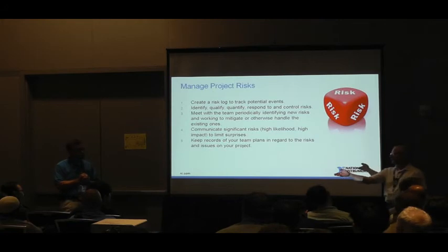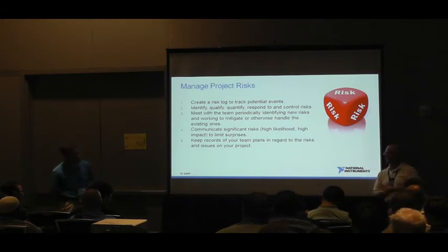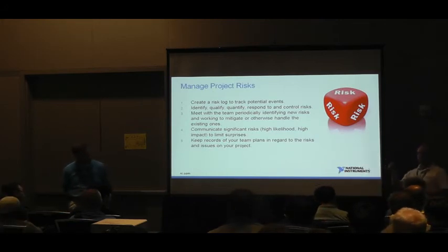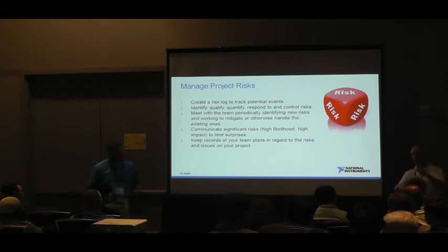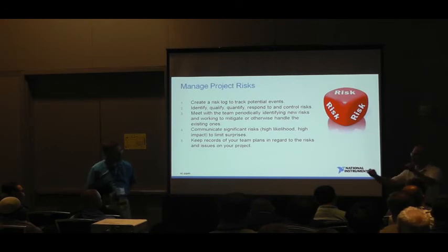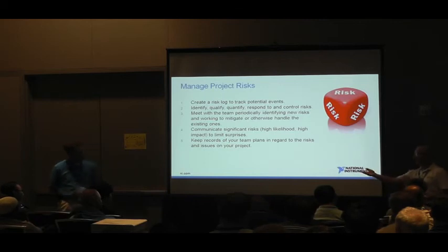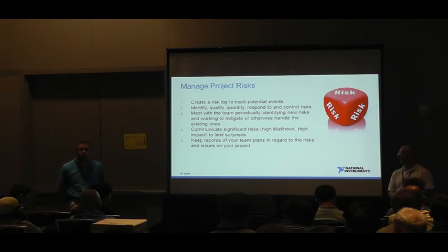And to your earlier question about prioritizing risks, there was a slide earlier where I didn't really talk much about the critical path. But when you've got that work breakdown structure and you've got predecessors and successors, then you can identify these are the things that are on my critical path to meet the end timeline. So I think prioritizing, making sure that you've got the highest risk items as your top priority, get your most attention, work those first, I think is a good plan.